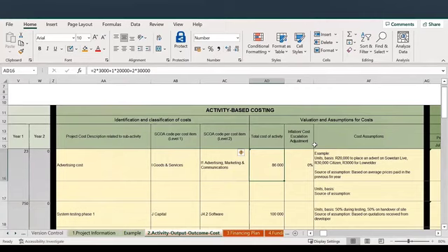So we've noted the units and the basis for the costing, and we also request that you provide us with a source of the assumption. So here, we assume that it will cost 20,000 to place an advert in Sowetan Live, and 30,000 in the Citizen, and 3,000 for the Lohfelder. I think in the activity description they mentioned 2 in the Lohfelder, 1 in the Sowetan Live, and 2 in the Citizen. And that's basically what has been calculated in cell AD16.